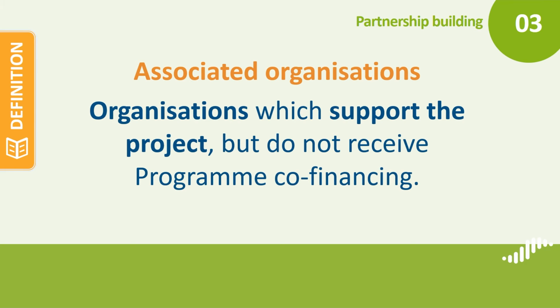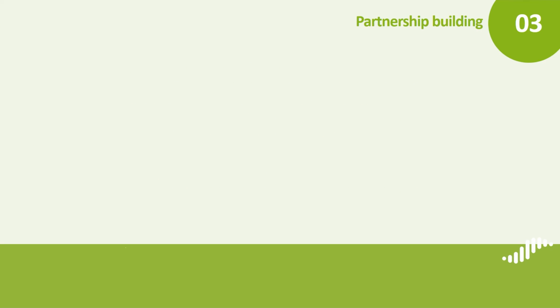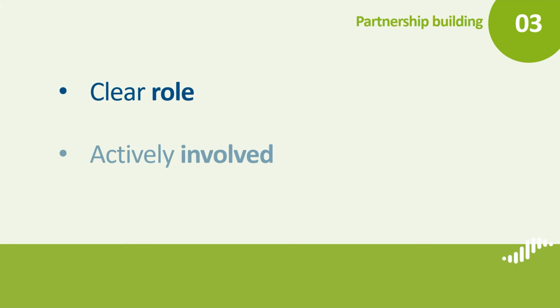Associated organizations support the project but do not receive program co-financing. You should not include partners only to have more regions or sectors represented. Each partner should have a clear role and be actively involved in the activities of at least one work package.